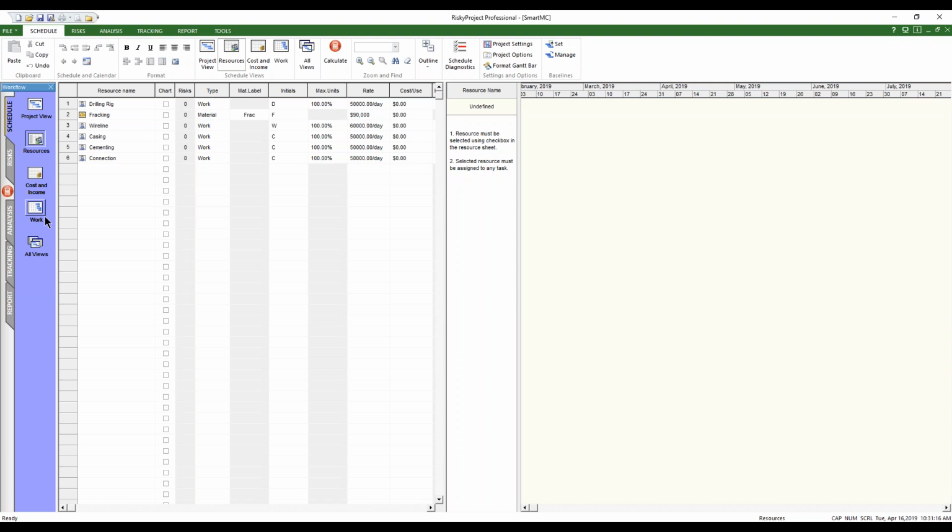There's going to be some logistical issues around that, and they will affect all of these activities. In that case, you might say they might cause an X% delay on all of these activities. You would then have to assign this schedule delay or schedule risk to multiple activities.